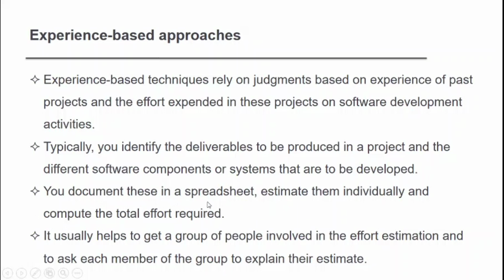You document this in a separate spreadsheet, estimate them individually, and compute the total effort required. Based on this experience, they will put it in an Excel sheet and calculate the overall effort involved and the cost of the project. It usually helps to get a group of people involved in the effort estimation and to ask each member of the group to explain their estimate. So this is the experience-based approach.